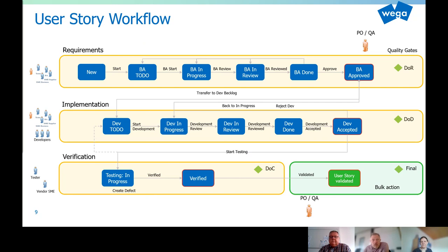Some of the developed increments will be staged to the validation environment during the release development. There's no clear rule when this will be done. It's a task of the PO in collaboration with the team to decide which increment is worth to be pushed to validation and execute the test cases. The so-called pre-release is deployed on the controlled validation environment, and here the final or still outstanding formal test runs will be performed. Again, the QA has to approve the final transition into status validated. Only if all stories are in status validated, we are entering the reporting phase where the release can be finalized. Validation reports will be written, and the release will be pushed to production environments following a defined process.